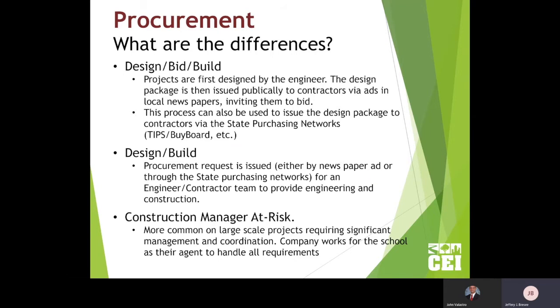Construction manager at risk, again, this is for big projects where a company who specializes in managing these projects will say to the school, for a certain percentage, we'll take the risk of doing the rest of the job, and we'll go find the competitive pricing, we'll find the best engineers, the best contractors, the best products, bring it all together. Those also have to be advertised. But once you bring that construction manager at risk on, you don't have to keep going out for public bids for each engineer, each contractor, each part. So there's a great deal of efficiency that can be realized if there's a lot of parts to be brought together on a large project.